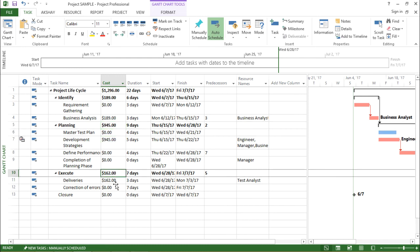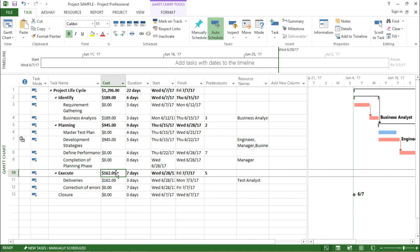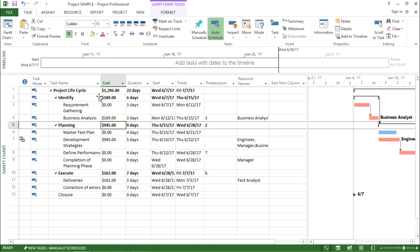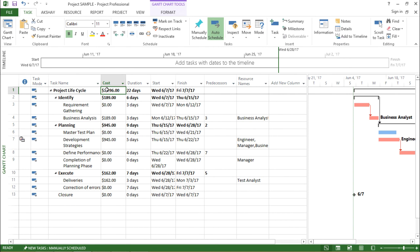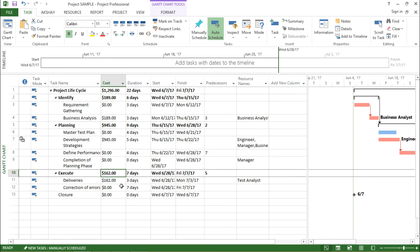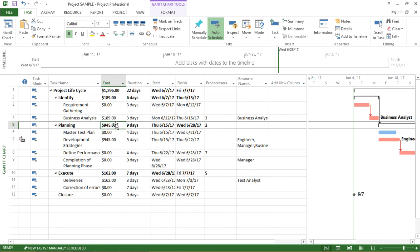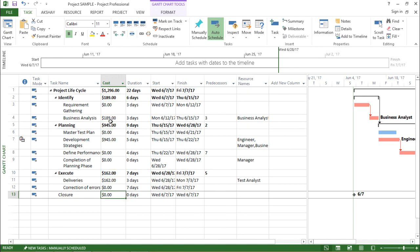has made the total out here. Now all this Execute, Planning and Identify sum together, and it makes addition of each other and gives me the total cost for the project lifecycle. So project lifecycle will involve addition of Identify, Planning and Execute, so it is the total of all these three sub-tasks.